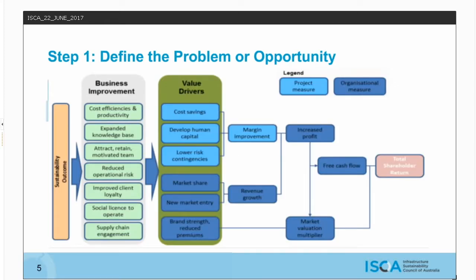So the second of these elements, identifying and analysing the problem or opportunity, should be based on data and information obtained from surveys, from modelling, from interviews and studies from a range of sources appropriate to the materiality of the issue in question. Problem or opportunity identification should not be confined to existing situations or issues either. Emerging and potential future problems or opportunities should also be considered. And investigate, at least at a high level, the explanations behind the problem or opportunity and identify its fundamental root causes and symptoms. Effective action can only be taken once the underlying cause and effect of a problem or opportunity are understood. So seek to develop at least a high-level understanding of the scale, the extent and the cost of the problem or opportunity. And note that the problem or opportunity definitions should be succinct.